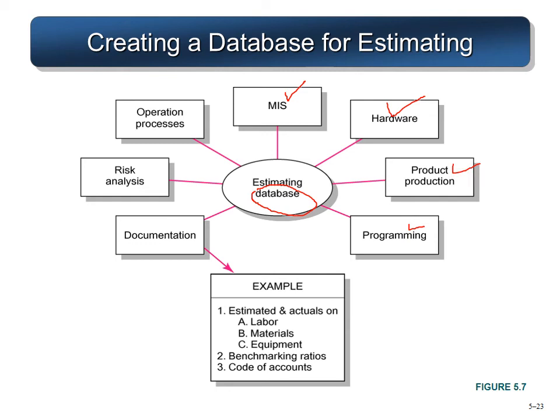So they create a database for each of those tasks from their previous projects. Based on the past record, they update those based on the requirement, and then come up with an estimate for the project.